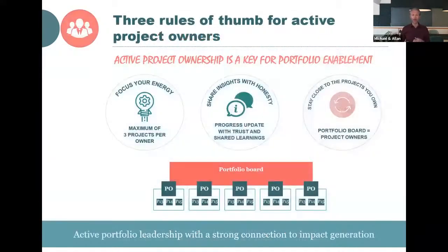So in this case, we would suggest that the portfolio board, let's say there are 5 people in it, would have access to run 15 projects at the same time. They will each pick 3 projects related to the strategic grid that you saw before and the impact grid, projects that they think are important to them and the business they're creating. Having 3 projects each is what we favor, and then you would leave the rest to your great colleagues in the board. This also gives a cap on how many projects we can run at the same time.